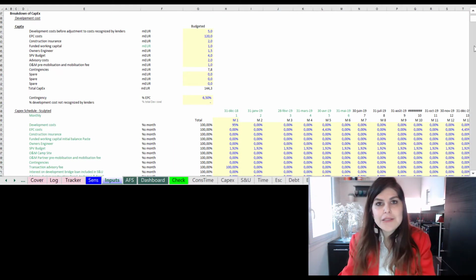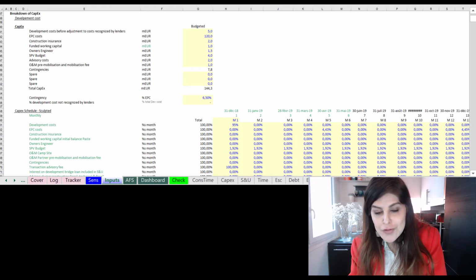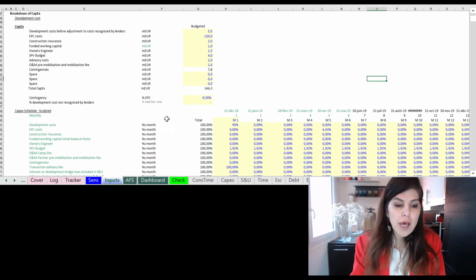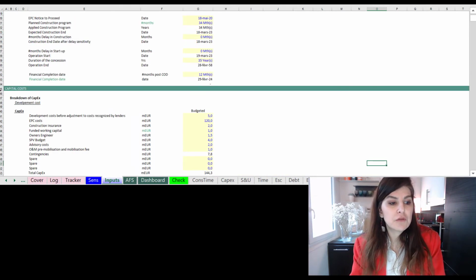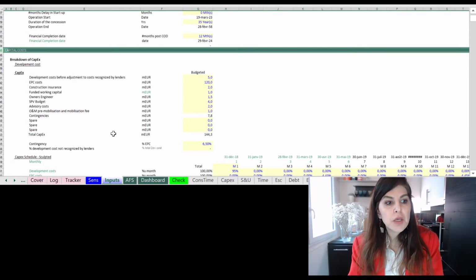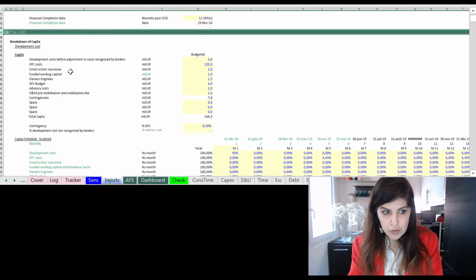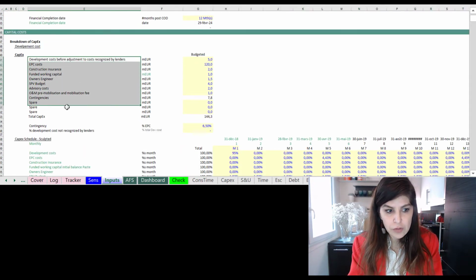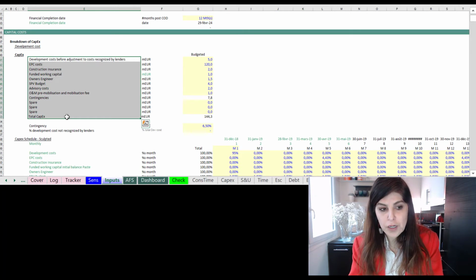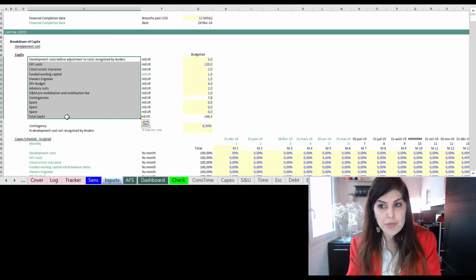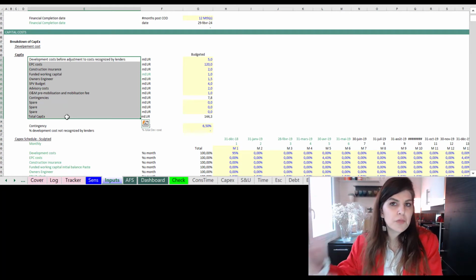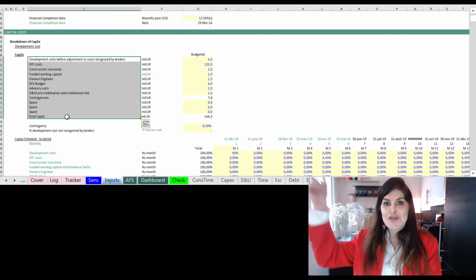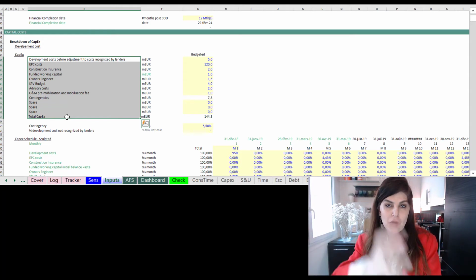Okay, so now let's look at one of my financial models, and I'm going to take you through the modeling of the contingency provision. So now I'm on my input sheet, and I have a section for the capital cost. In this section, I have listed all the main capex items, physical capex, not financial. The interest during construction, commitment fees, upfront fees, and funding of the debt service reserve account will all come as part of the budget.